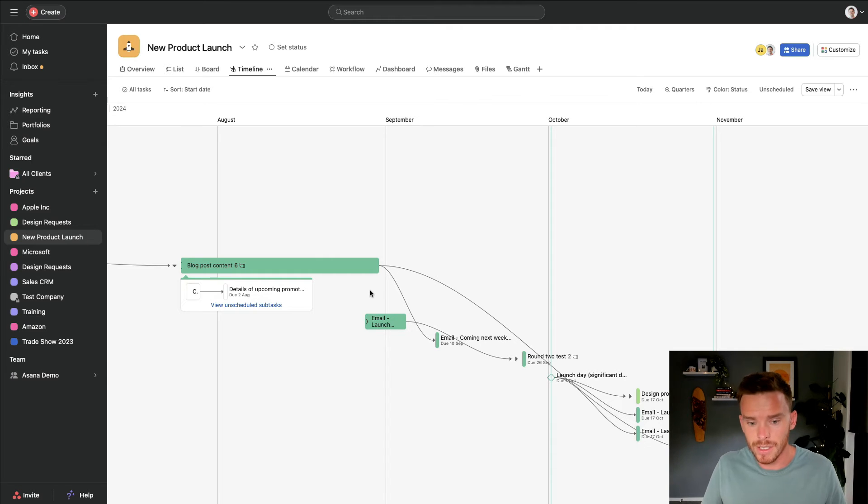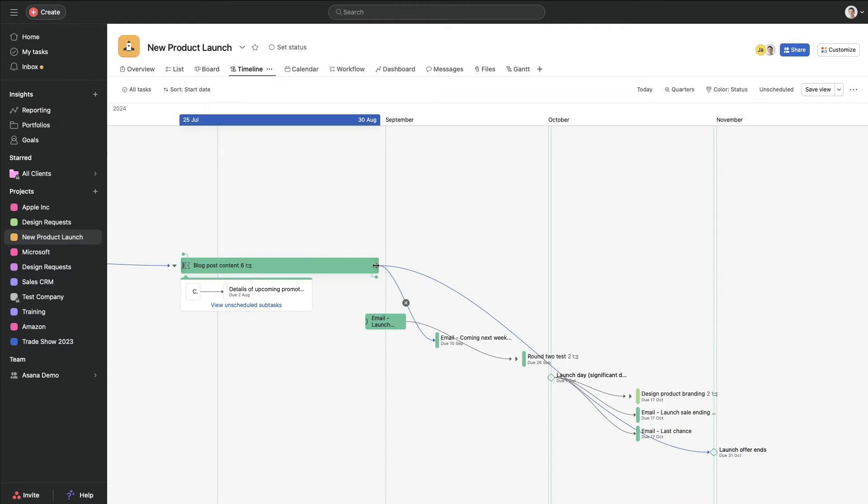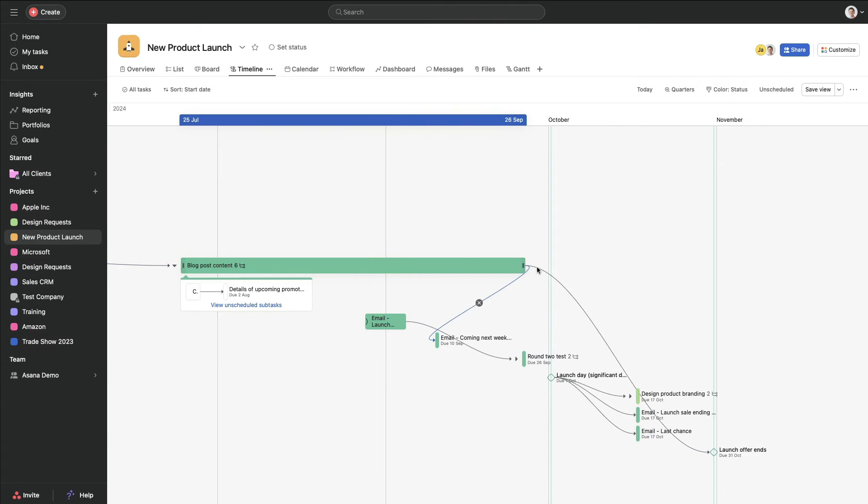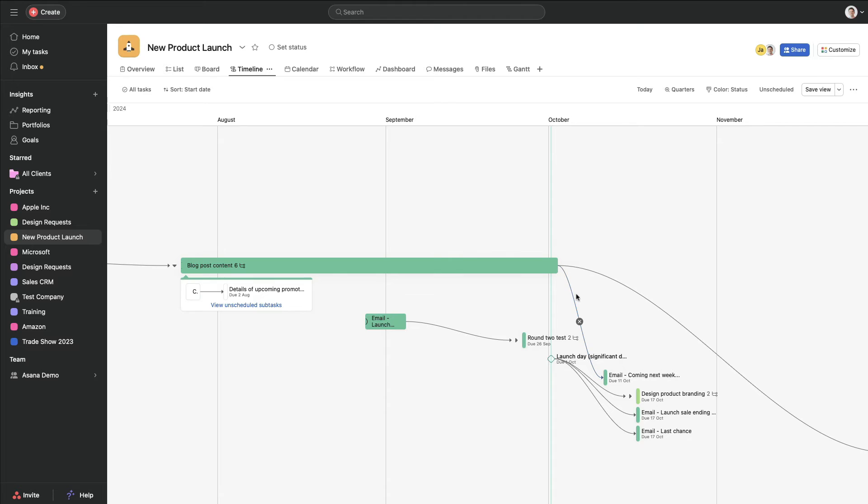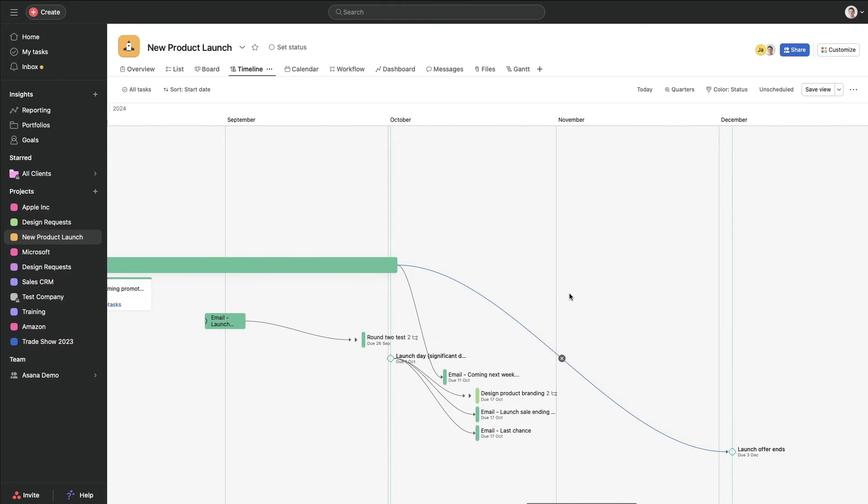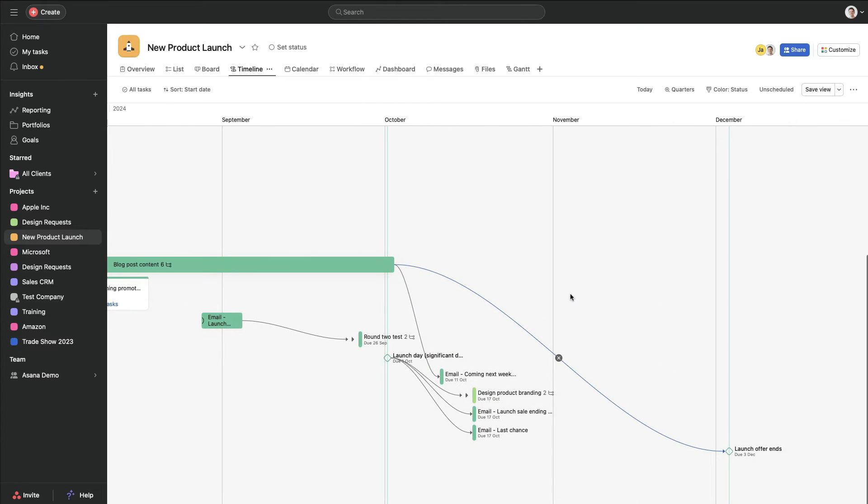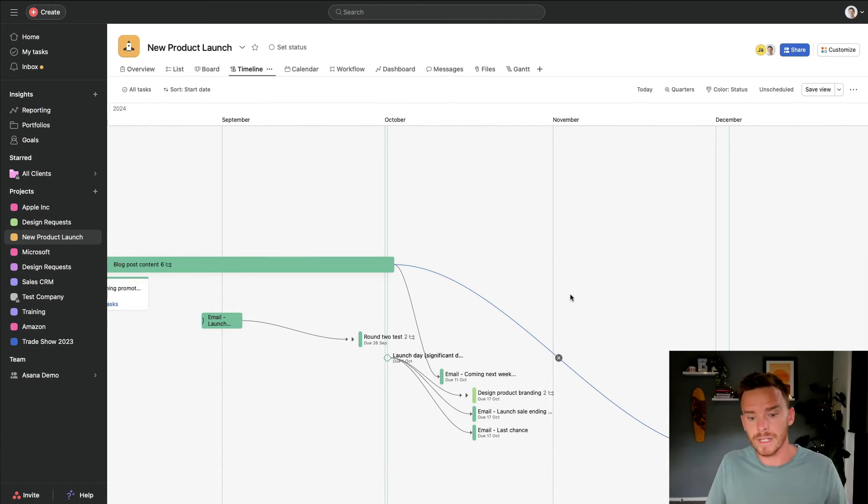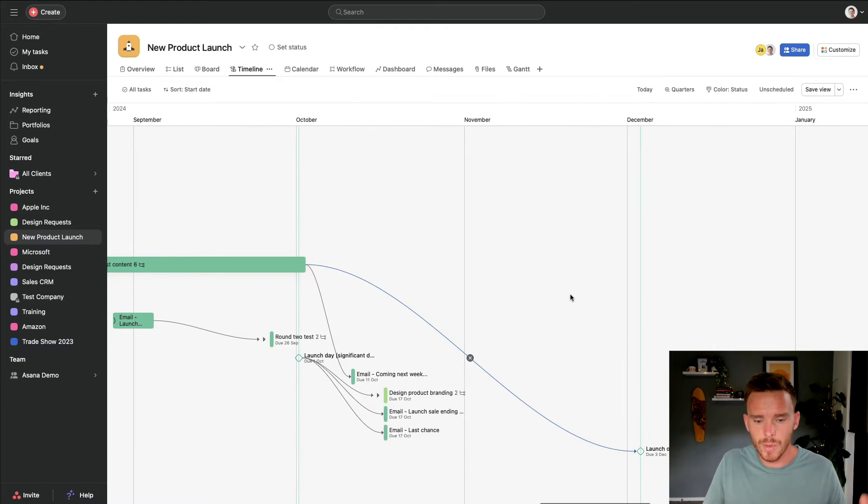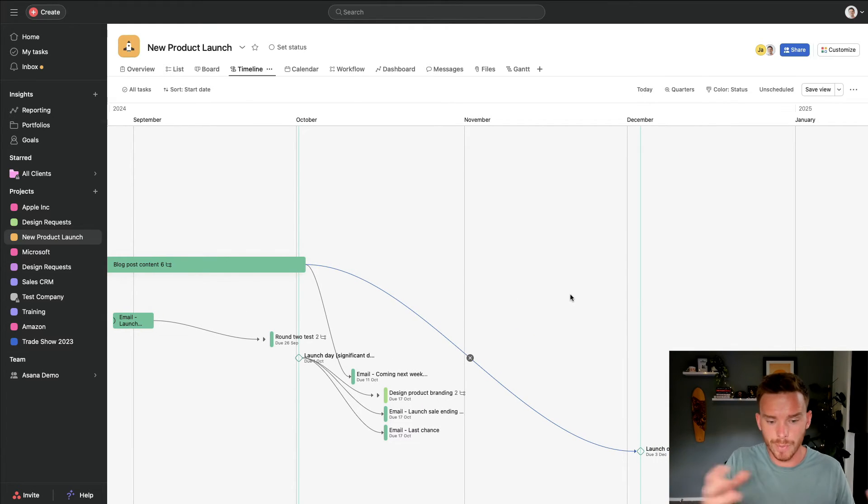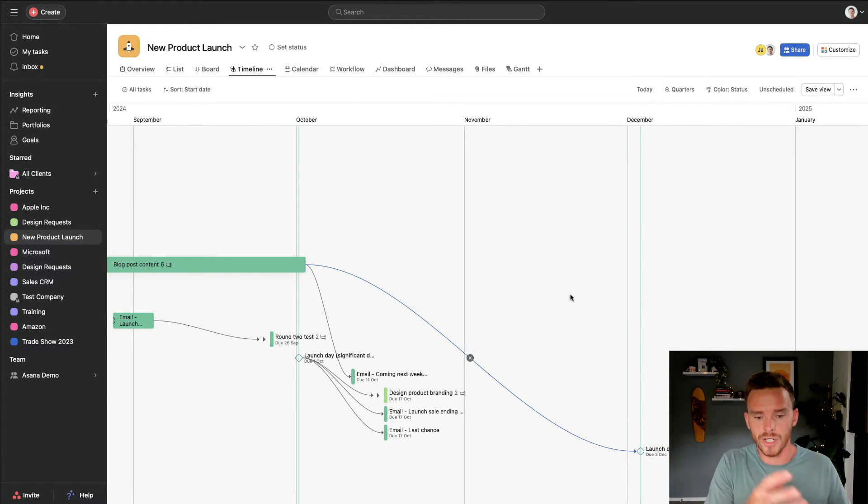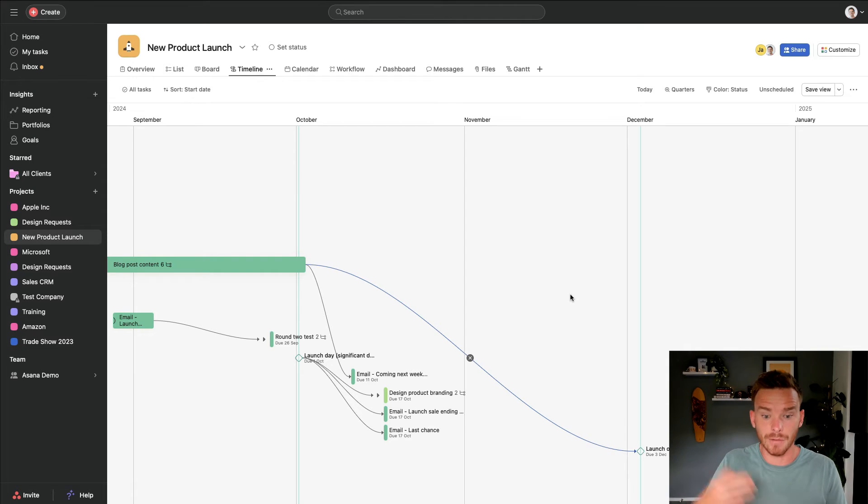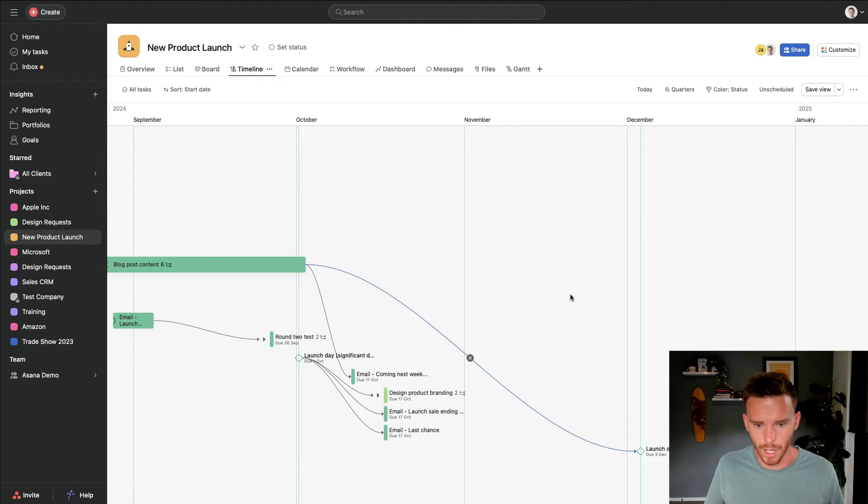The other reason to use these dependencies is if I need to delay the project or a task, I can shift this task back and watch what happens. It's going to automatically adjust those downstream dependent tasks. So this is really useful if you do need to push back certain tasks or push back the project itself, and you want to adjust the timeline and everyone else's work all in one go.